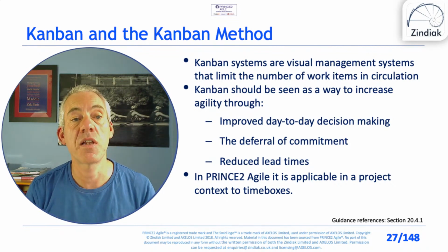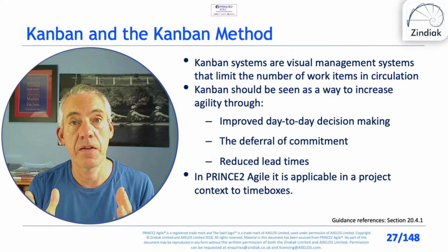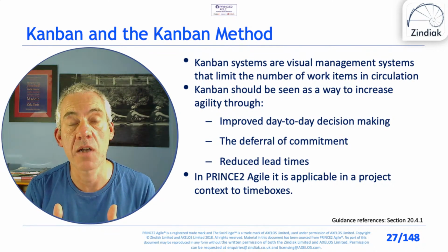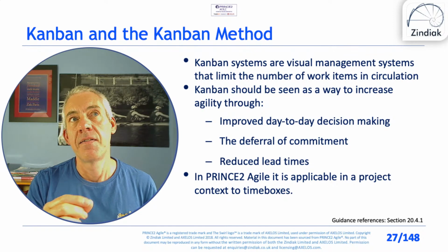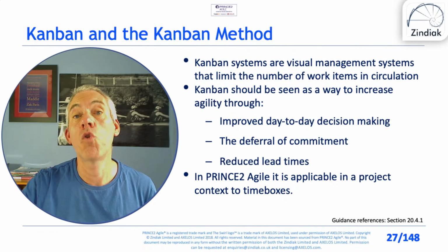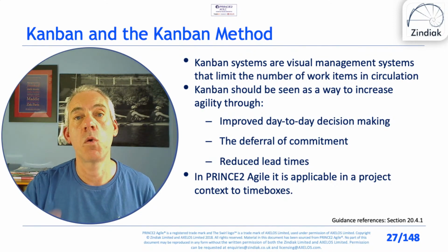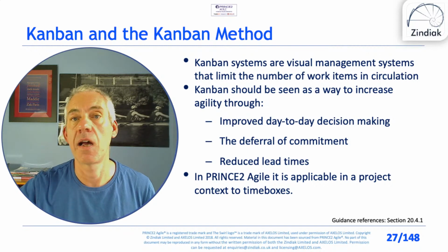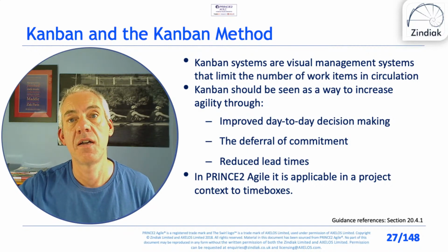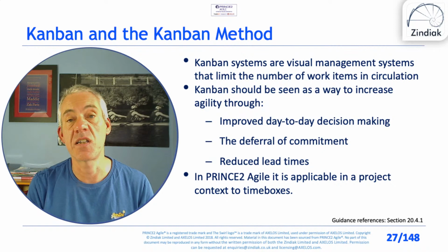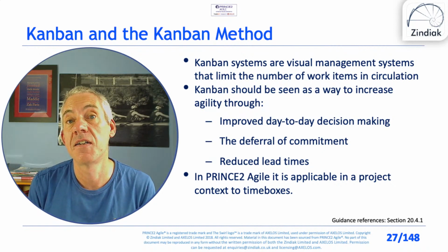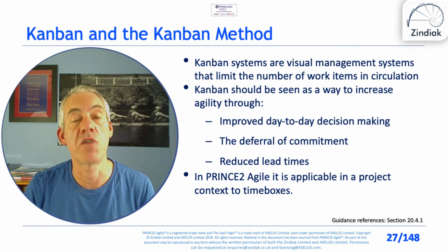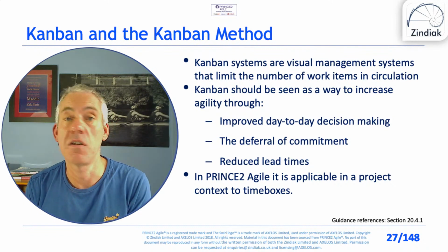And it can help reduce lead time, because the limiting work in progress part of it helps with task switching. And you kind of need more than one thing to do. If you've only got one thing to do, there will be times when you're waiting on something else or someone else. So I've written some code, I've set it to compile, it's going to take 5 minutes to compile, I've got 5 minutes free. All right, I might go and get a coffee or something, stretch my legs, but maybe I can do something else.